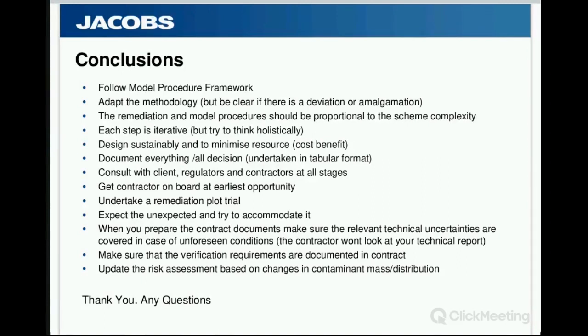Consult with your clients, regulators, and contractors at all stages. Don't be afraid to phone contractors. Don't be afraid to give them a call. You know, they're happy to give you a quote and give you advice. Certainly, always undertake a remediation pilot trial, and definitely expect the unexpected, because the remediation will always throw up something that you haven't thought of.